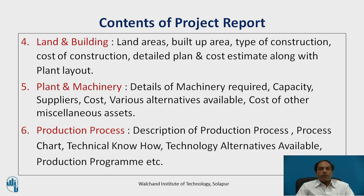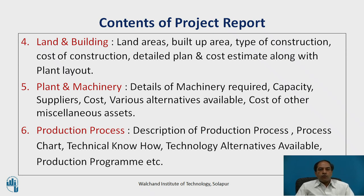Land and building: what is the area available, what is the built-up area requirement, what is the type of construction — temporary or permanent — and what is the cost of construction, detailed plan, cost estimate along with plant layout. We also need to have legal compliances related to land and building, approvals from various government agencies, and most importantly a building license — a permission to use or permit to use — before you are allowed to use that land and building for the particular purpose.